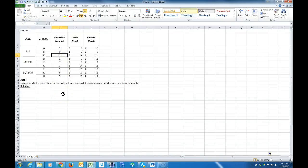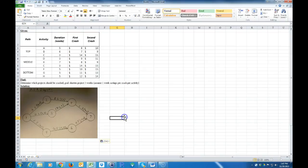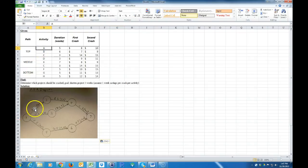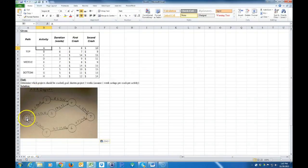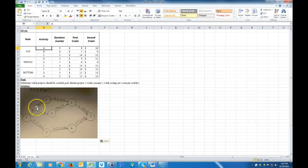The first thing we have to do before we proceed is create a network diagram. I'm going to show you a template which requires me to do the network diagram in a certain way. So I went ahead and pre-did the network diagram. This is called the activity on arrow diagram — each activity is labeled on the arrow with numbered nodes. There's another type called activity on node, but the template requires the activity on arrow diagram.